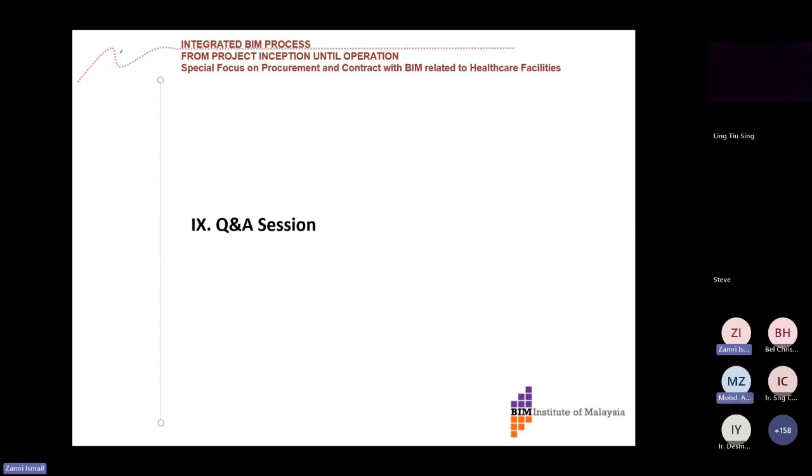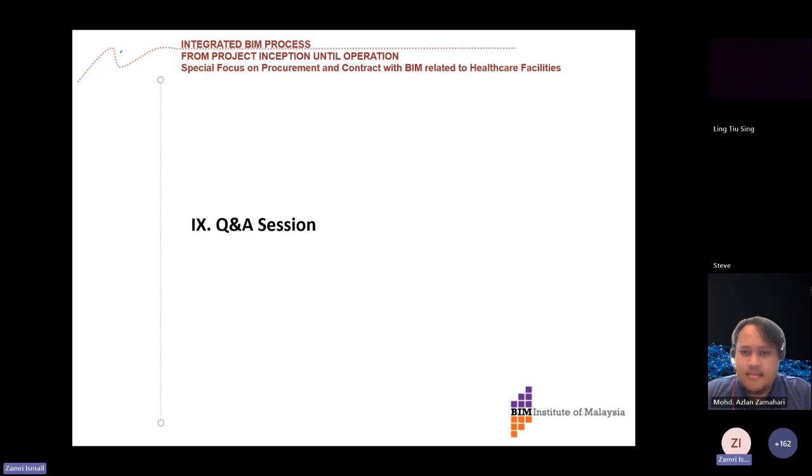Okay, thank you, Cik Azlan. The answer to that, as we mentioned earlier: at the starting of any project, you should have a BIM project execution plan. The person who is responsible for the BPEP is the BIM manager. BIM manager is not somebody who just came out fresh from university and knows how to use Revit software and becomes BIM manager, because it involves a lot of understanding of project delivery, contractual matters, compliance with relevant laws and so on. So among the BIM fraternity, we say you must have experience in delivering projects between 5 to 10 years to be a BIM manager.